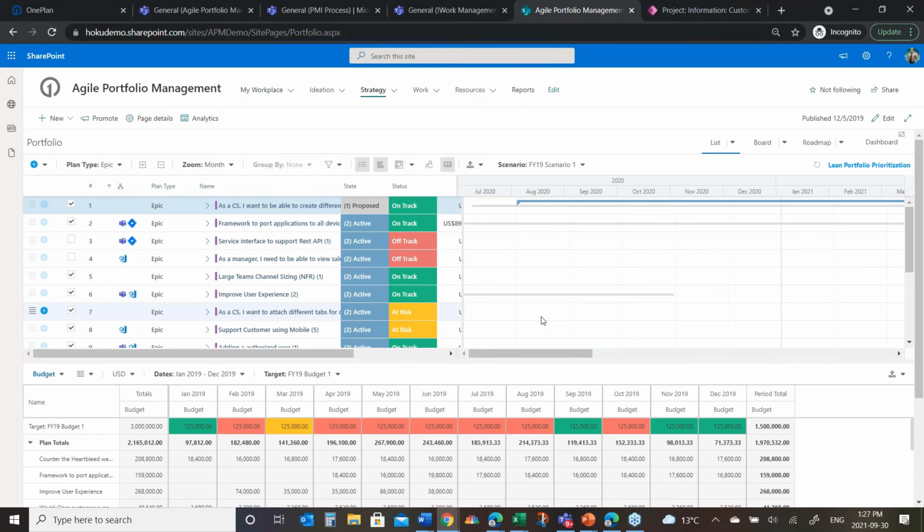So we're doing that prioritization and planning here. And I'm not going to sit here and play around with any more of this, but the concepts are there. I set that target, I move my data, I maybe pause some projects. You can see the ones that I clicked. A couple, they're off track, so there may be a reason why we want to stop them anyway, because they could be threatening the budget in other ways. I could then turn around and look at this from a resourcing perspective and say, where are we in terms of resourcing availability and resourcing capacity against those same projects? And then I save the scenario and move forward with my planning and executing on these projects.